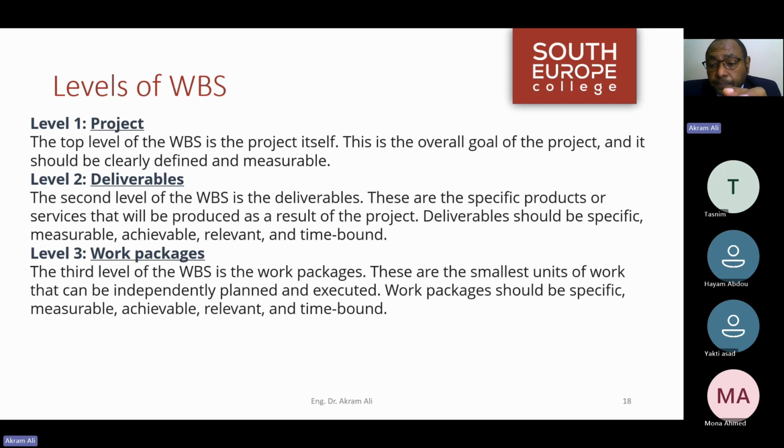breakdown structure. And after I have decomposed it into small parts, I will take each part and decompose it into work packages, and I will take the work packages and divide it into activities. So I can make my milestones against work packages, or I can make my milestone against the smallest product breakdown structure.